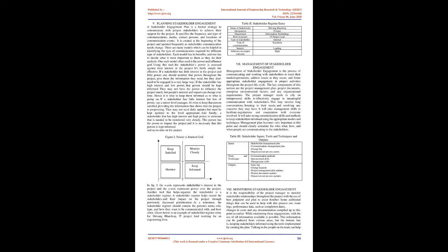Stakeholder register entry. Name of stakeholder: Shivang Bardwa. Designation: primary. Department: Information Technology. Role in project: IT project lead. Type of stakeholder: internal. Type of communication: in-person. Interest: leading. Influence on project: high.